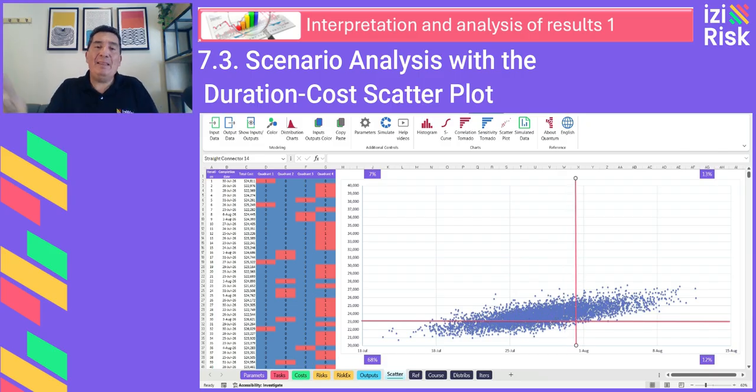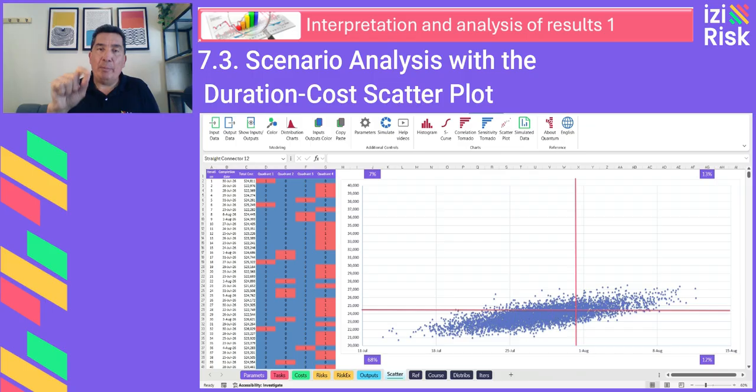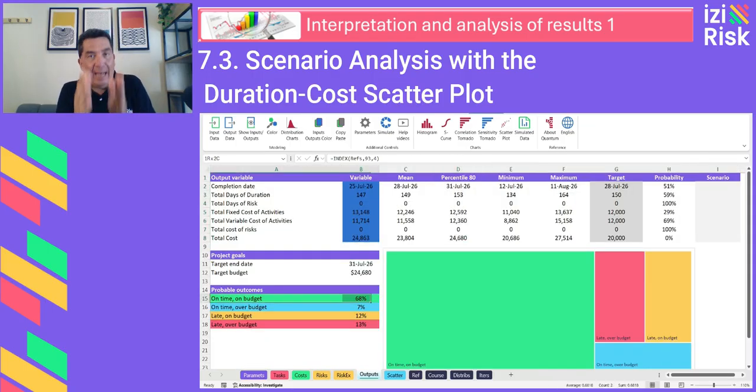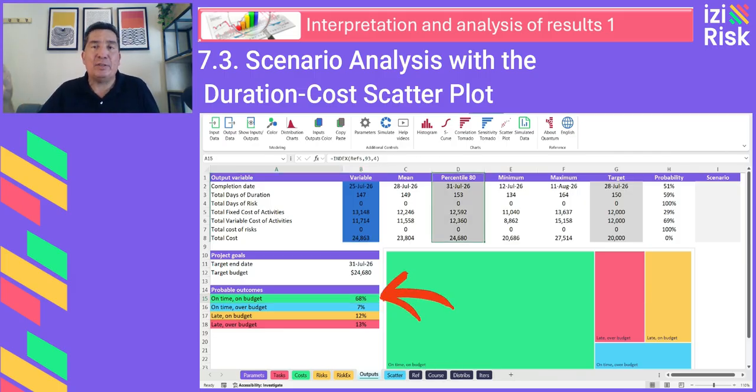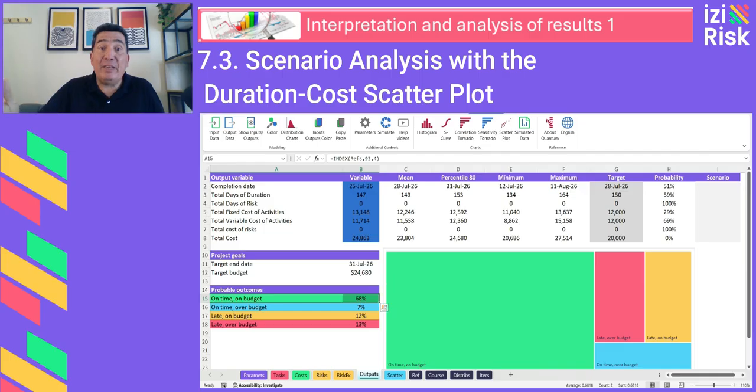After applying the new goals and updating the chart, the probability of success meeting both targets, time and cost, increases to 68% probability of success. This means that if we use more realistic percentiles, 2 out of 3 times the project will succeed.